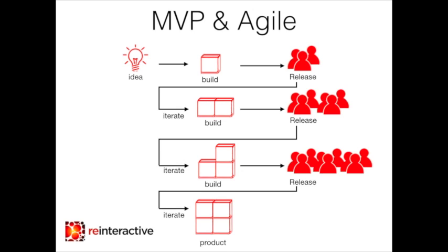But what it really means is that we want to build software in an iterative manner. We deliver an iteration, we release it to a small set of users, and we deliver functionality that provides enough value to those users that they're going to start using the product. And then we build on top of that release and build more features and provide even more value in each subsequent release. And each subsequent release increases the potential target market. So we might start off with a very small subset of users because they've got the least demanding needs, and as we build out the features, we target more and more variety in our users.